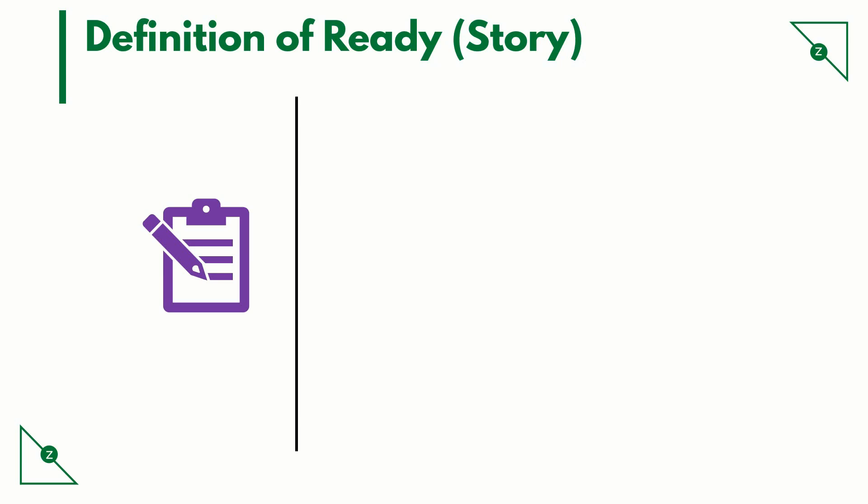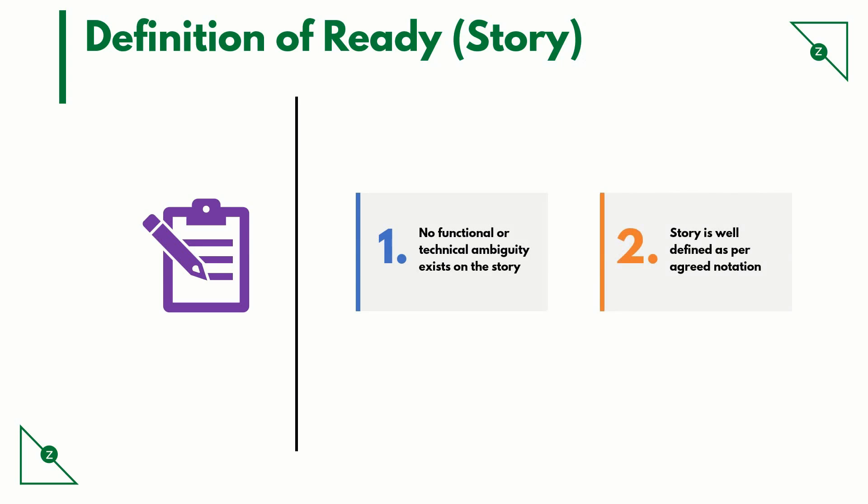Here are some example pointers for definition of ready for a story. No functional or technical ambiguity exists in the story. For functional ambiguities, the product owner should have resolved any open clarifications. On the technical ambiguity, either the technical lead or technical architect should have resolved any open questions. The story is well defined as per agreed notation — remember the BDD notation that we discussed earlier.